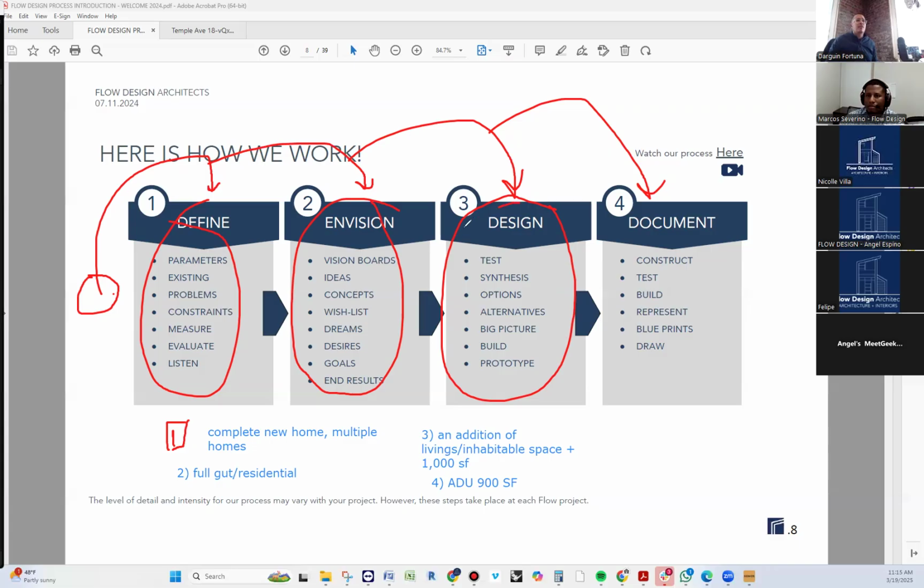At this point, you don't have enough information on step 3 to really give them anything. No base plans, nothing like that. But as soon as a plan is selected and you have your permit set pretty much finalized, I would like you to send it to AJ and Herb. CC me, because I deal with all contract negotiations on that, and send it to them, along with a survey document that we have created here at Flow Design Architects that you're going to pre-fill.